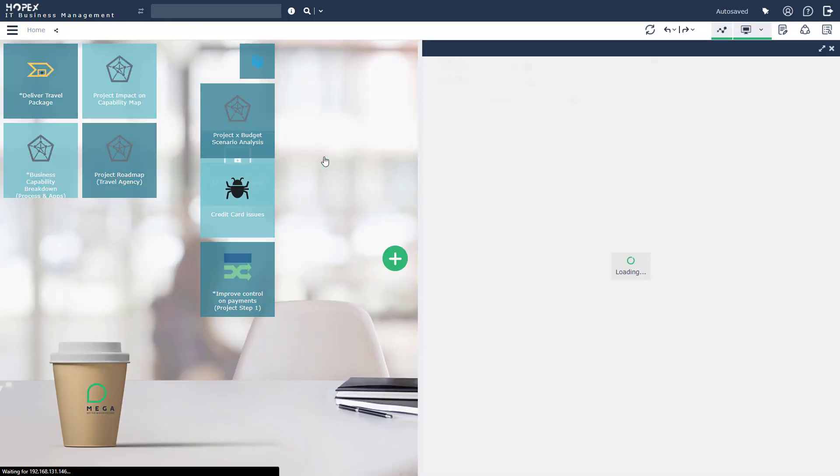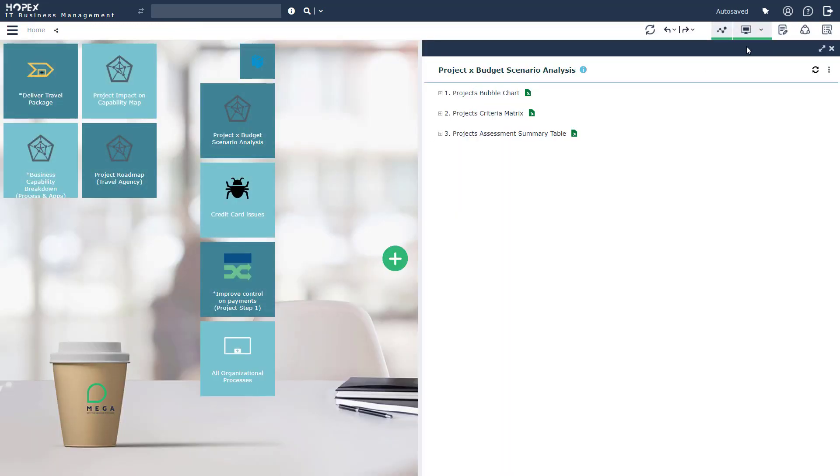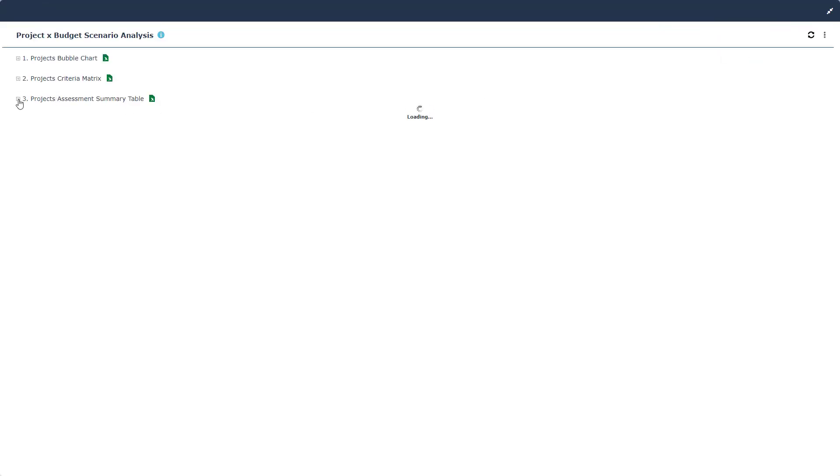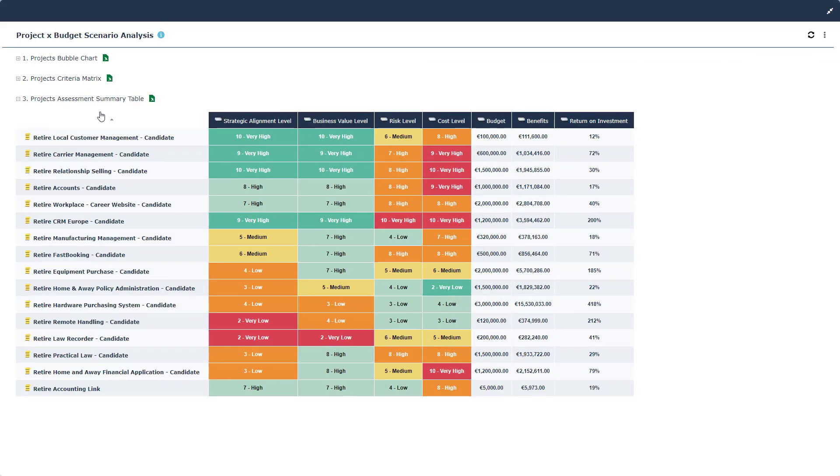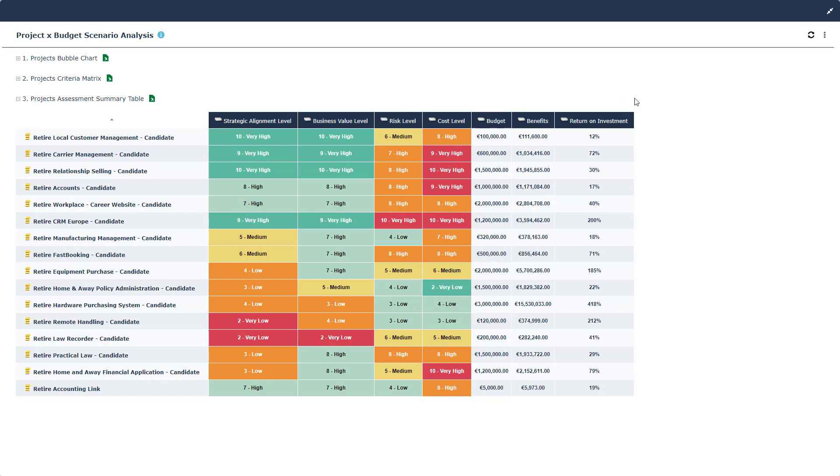The next report allows us to understand from a financial perspective, what is the impact of the projects that I'm going to be undertaking. So here we can see these are different projects that are candidate projects, meaning that they're still being evaluated. We can see that there's been an assessment done on strategic alignment, business value, risk, and cost. This has resulted in budget information and a benefits analysis, which then Hopex leverages to conduct an ROI. Using this information, we can begin to understand what scenarios, what candidate projects do we really want to prioritize. Since budget is not often unlimited, there are only certain projects that can be in scope this year.